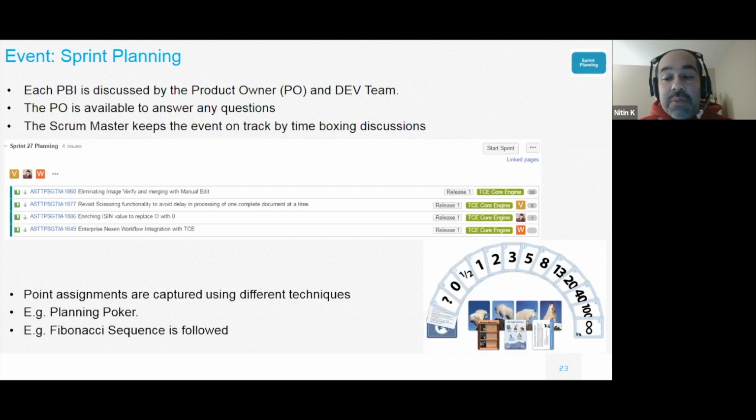And epic points could mean, hey, let's say your epic is 20 points or higher. So you just get a quick snippet of things, and your dev team members could say, okay, this is a 20, this is a 40, this is a 100, knowing that they will break it down further down. But then again, given their past history or velocity as a team, they might be able to give a prediction of how much time this will take. So there are different ways of doing numbers, different techniques, and I just want to throw out both. It could be epic points or story points. Again, these are all going to be product backlog items.